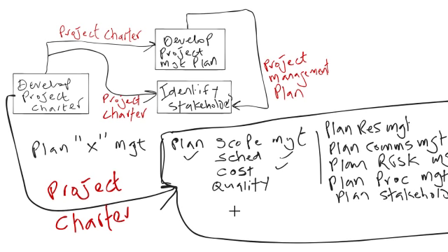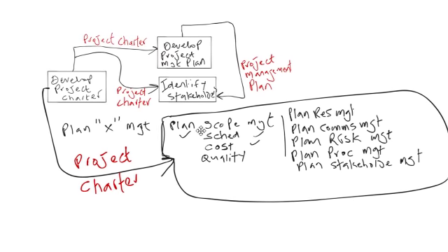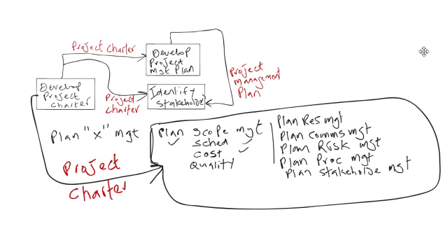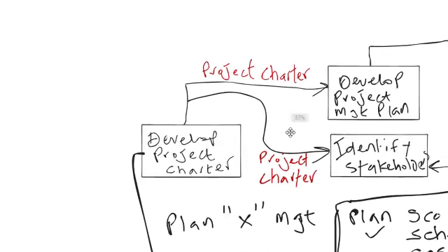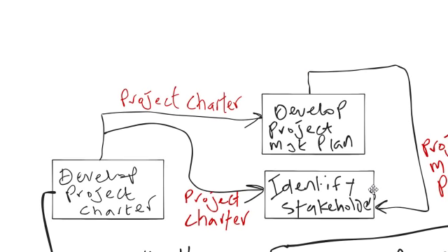Remember, this is the 101 of your PMP exam prep. So before we begin showing you a few other places, make sure you get a handle of this. Project charter goes to develop project management plan. It also goes to identify stakeholders, also in initiating, and it goes to wherever you're creating a subsidiary plan. Okay, now you've got that. Let's zoom in to this picture one more time. And let's show a couple more relationships that will help you as you study for the exam.